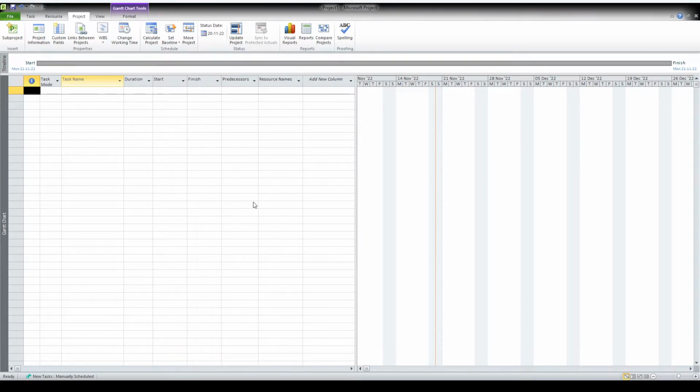Now exceptions. Here I want to give holidays. You can give them as per your holiday list. There will be Republic Day, Independence Day, Holi, Pongal, Deepavali, and all those holidays where there will not be any activities at site. You can give a list here. For example, I'm giving Republic Day first.